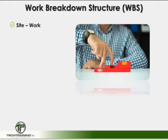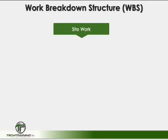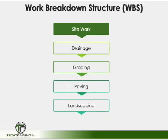The work breakdown structure describes the various components of the project schedule. In a typical building, the WBS would contain systems such as site work, structure, mechanical, electrical, plumbing, etc. A work breakdown structure begins with the major components of the tasks, and then each system is broken down into greater and greater detail. For example, site work may include drainage, grading, paving, landscaping, and so on. The WBS identifies all of the activities that need to be done within a particular task.